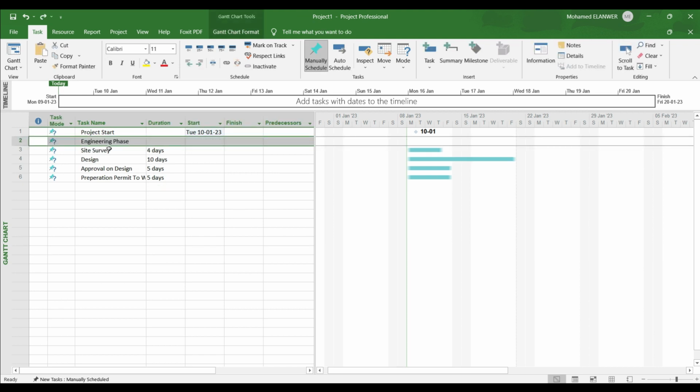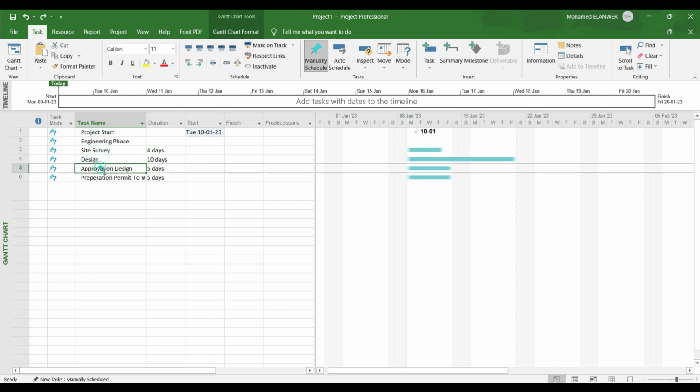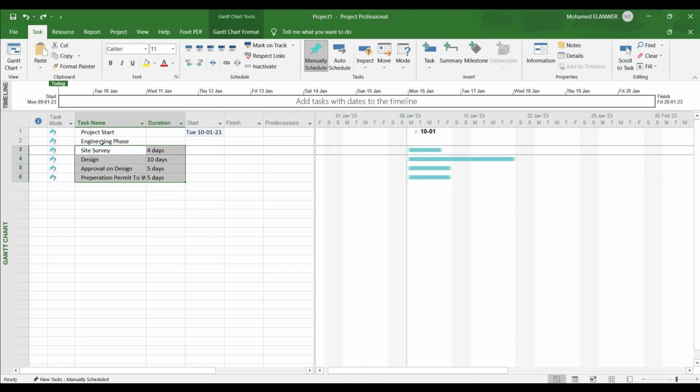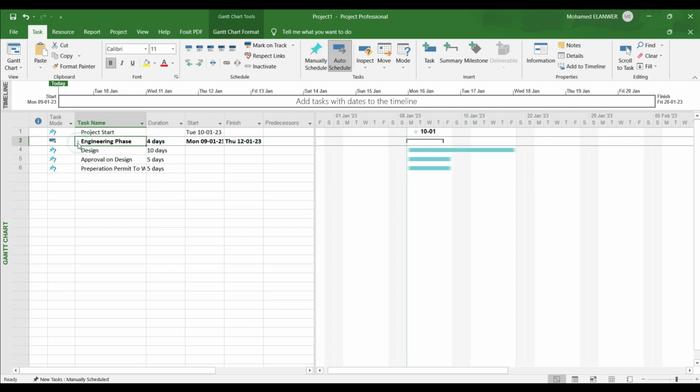Ctrl Z again. Or you have a child from the main task. This means the subtasks. You can use, from Tasks, Schedule, outdent or indent. Now it's indented. This means it's part of the major task. Here you can expand or collapse the tasks related to the summary task.